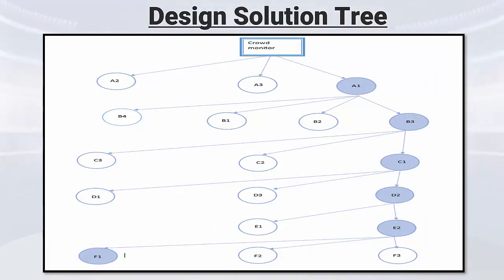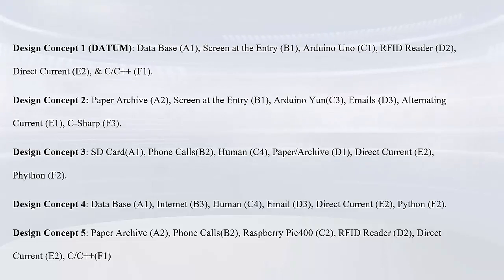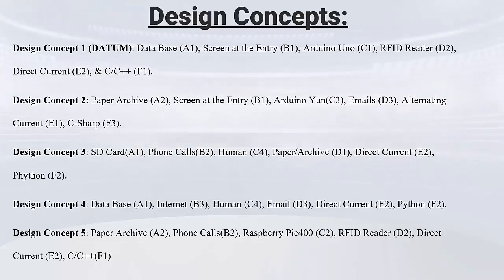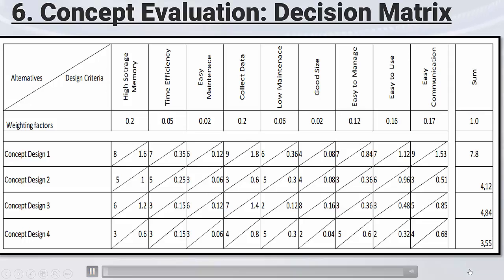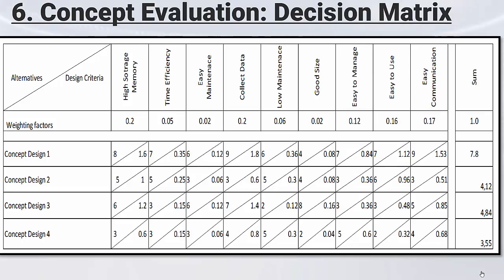Before anything else, we generated five design concepts in which the data corresponds to using a database screen entry, Arduino Uno, RFID reader, Direct Current, and C or C++ programming language. There exist many methods on which we can perform a concept evaluation. Among them, we find our decision matrix, which enables us to evaluate and prioritize a list of options and is used as a decision-making tool. The team established a list of weighted criteria, such as 0.2 for collecting data and 0.12 for easy management, and evaluated each option against those criteria. At the end, Concept Design 1, which had the highest sum, was selected as the best option.